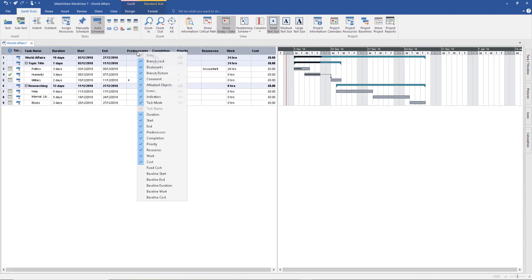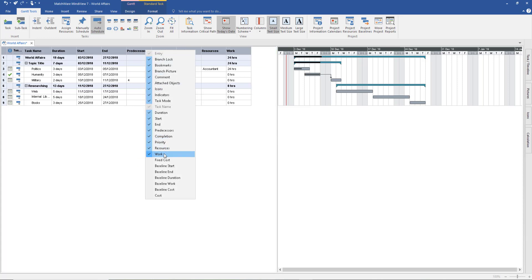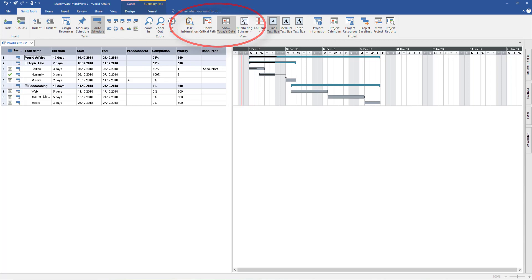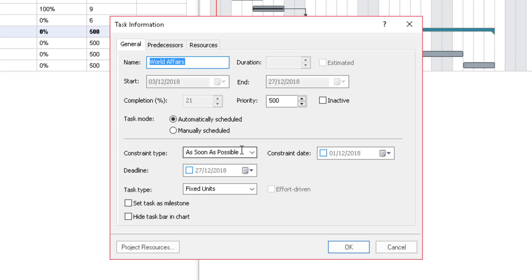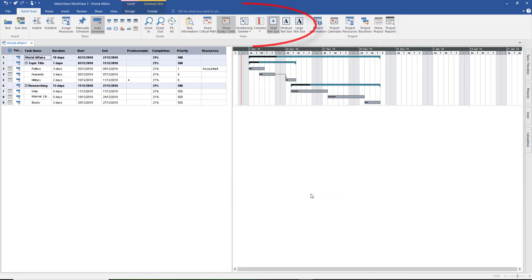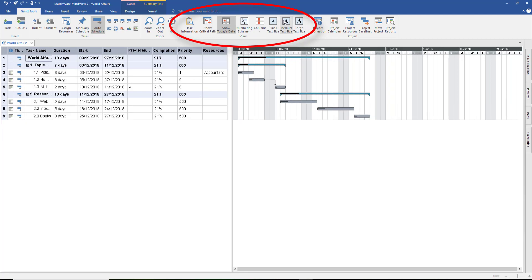There's a lot going on up here. If you do a right click, you can choose what you don't want to see — for example, if you're not interested in cost or work, you can remove those columns to simplify the view. If you click on world affairs and come to the top, Task Information gives you an overview — automatically scheduled, constraint type such as 'as soon as possible' or 'start no earlier than', a constraint date for deadlines, and task type such as fixed duration or fixed work. Numbering can be useful — select a numbering scheme and it numbers the tasks on the left clearly.